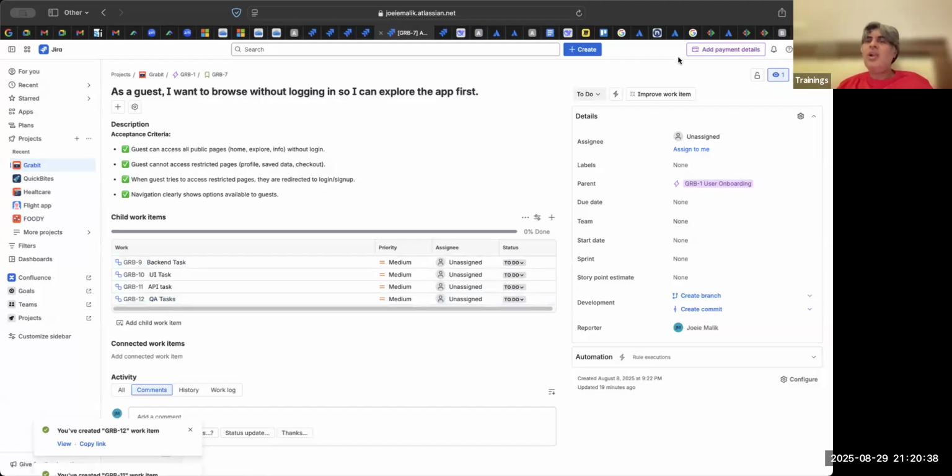Okay, now they say it's very simple, UI is simple, API is simple, backend simple, very, very simple. If it is so simple, then let us call it a baseline story. The sprint value I haven't added. So where are my story points? There are my story points. I just have to put a 2 there. Scrum Master can do it, PO can do it, team can do it after a discussion.